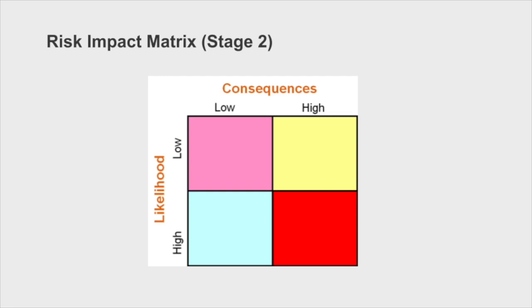We also need to evaluate each one of the suggested problems that could come up, some of the potential risks, and evaluate or weight their potential consequence on the success of the project. Meaning that if, for example, there were a fire that would destroy everything, the consequences of a fire could be devastating. So very high consequences to a fire. A ladder falling down or a ladder breaking, it could have consequences if it fell on someone, but in terms of the overall success of the project, probably very low.